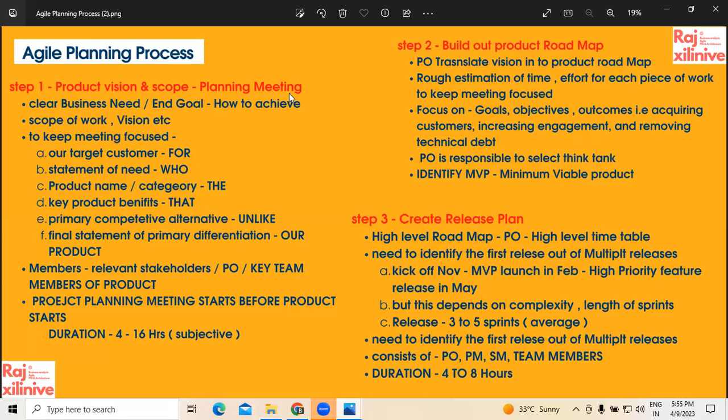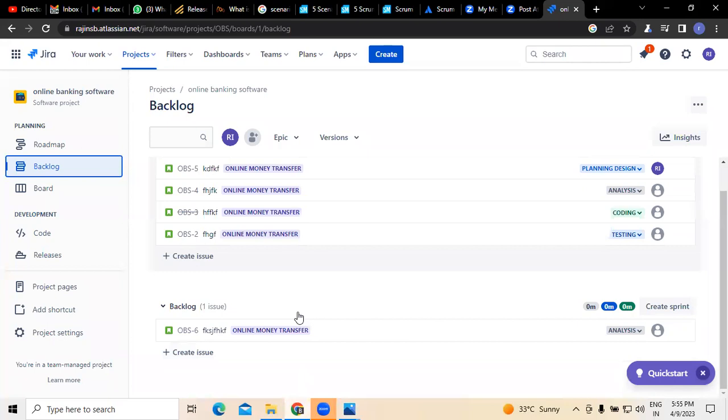So product backlog refinement happens when any changes happen in the existing product backlog. And one more point to be noted is that the product backlog is not only for user stories. Product backlog is a combination of even epics, even tasks can be included in it, or else technical debts can be included in it. Even if any bugs were identified by the team, updating of bugs can also be done in the backlog. Did you understand this? Right.